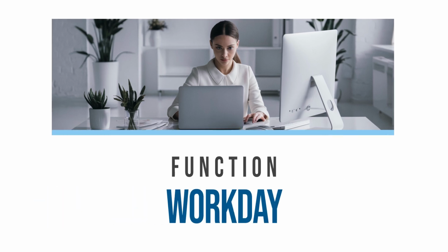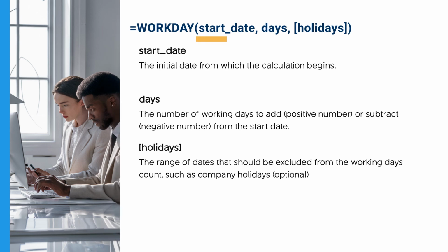The Workday function in SmartSheet calculates a date that is a specified number of working days before or after a start date. The basic syntax for the Workday function is as follows. Start date, the initial date from which the calculation begins. Days, the number of working days to add (positive number) or subtract (negative number) from the start date. Holidays, an optional range of dates that should be excluded from the working days count, such as company holidays.